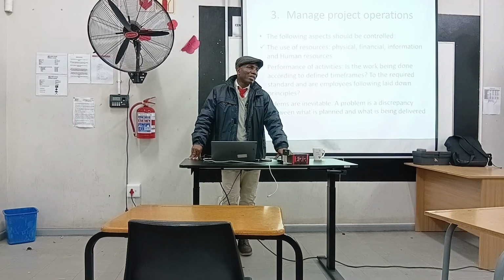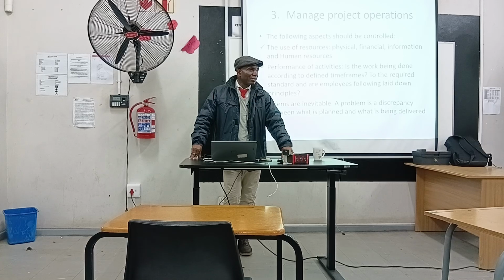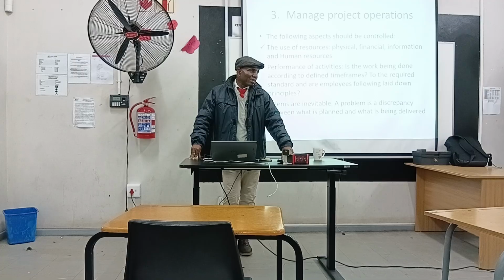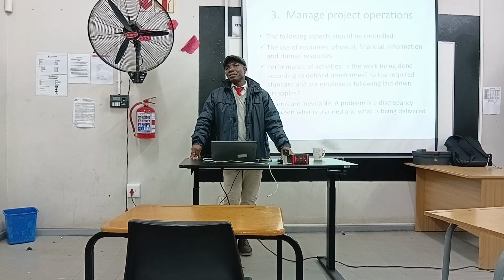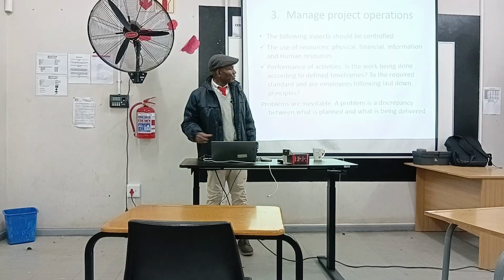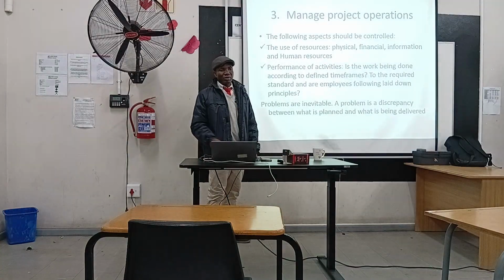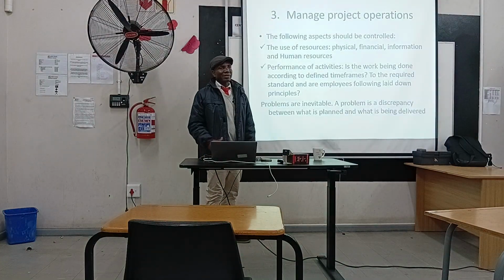For example, they say each day that you don't deliver, each day beyond the delivery date, you can say perhaps 500 rand a day. So if you delay your project beyond the delivery date, let's say 10 days after, then 500 rand times 10 is a lot of money. You should always strive to avoid such a penalty, right?